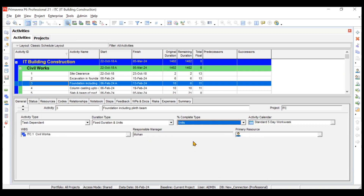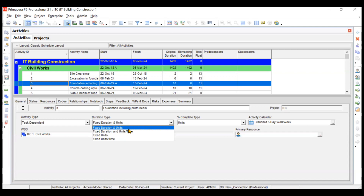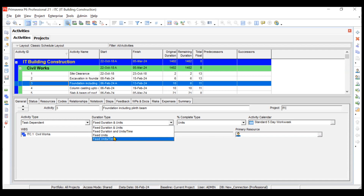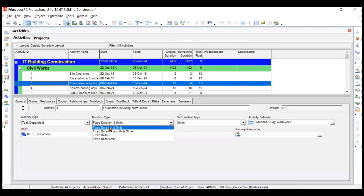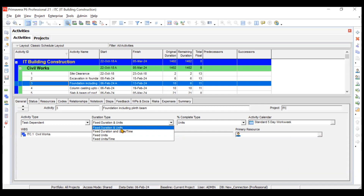For units type it behaves the same — you must enter values manually. Now looking at duration types: there are four types — fixed duration and units, fixed duration and units per time, fixed units, and fixed units per time. The first two are not resource driven, while the last two are resource driven because duration is not fixed in those cases.